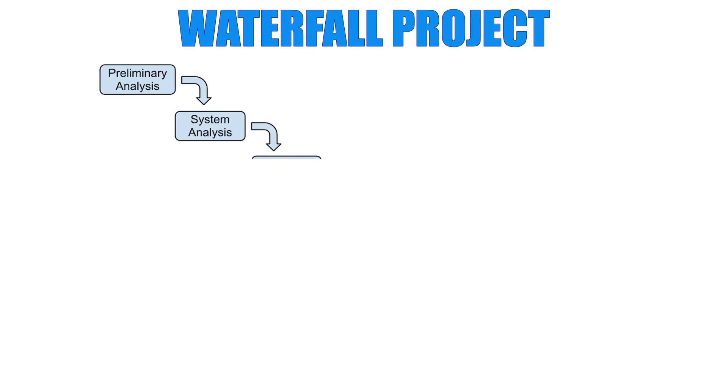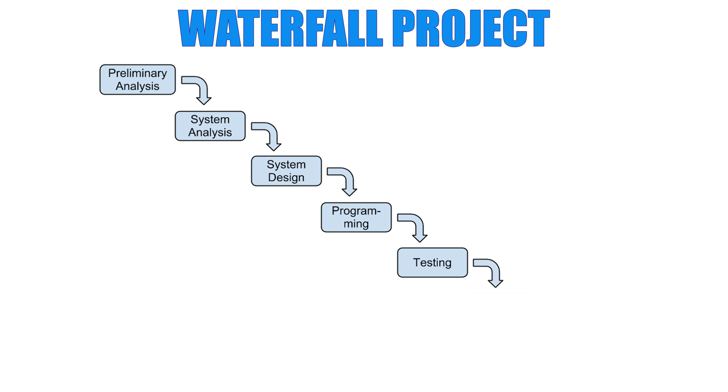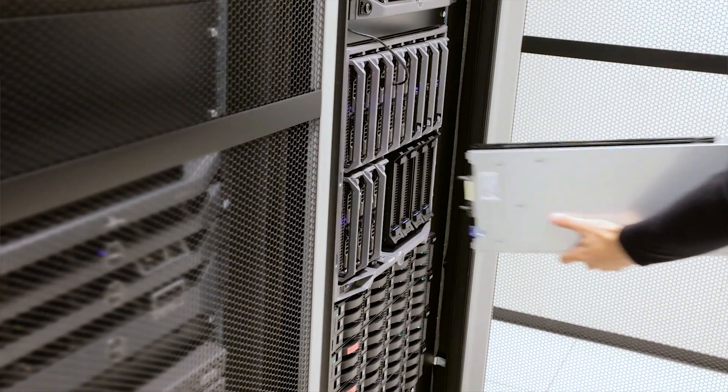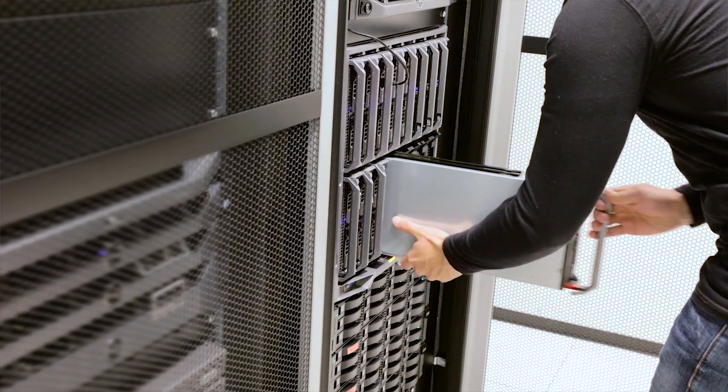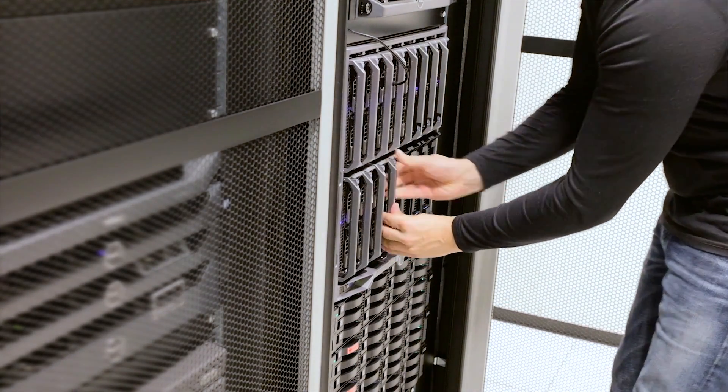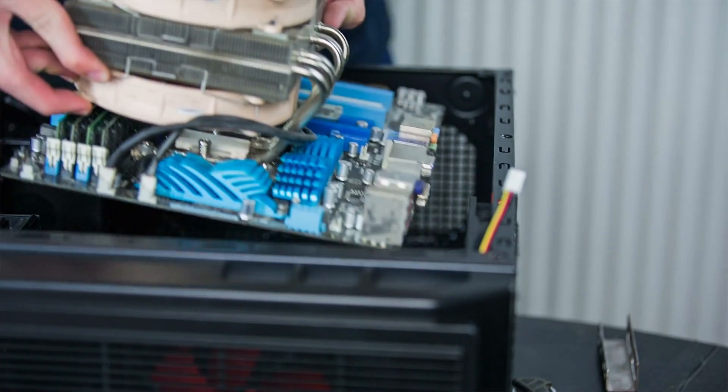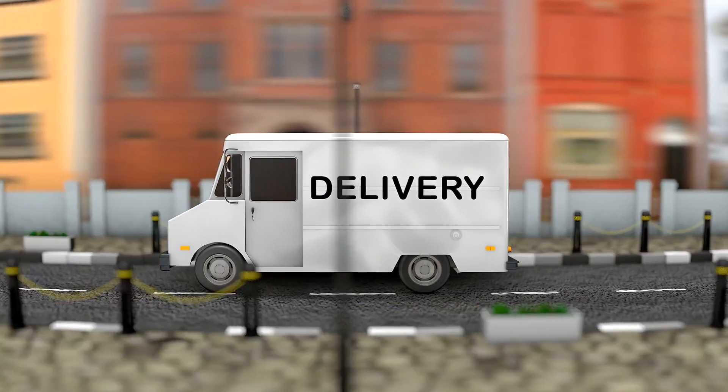In the IT world, you tend to see more waterfall-type projects — things are lined out sequentially: do A, then B, then C. That works well because tasks often depend on each other. For example, you can't install a server until you build it, can't build it until you have the parts, and can't get the parts until you get approval from finance to cut a PO. All of those things have to happen sequentially.